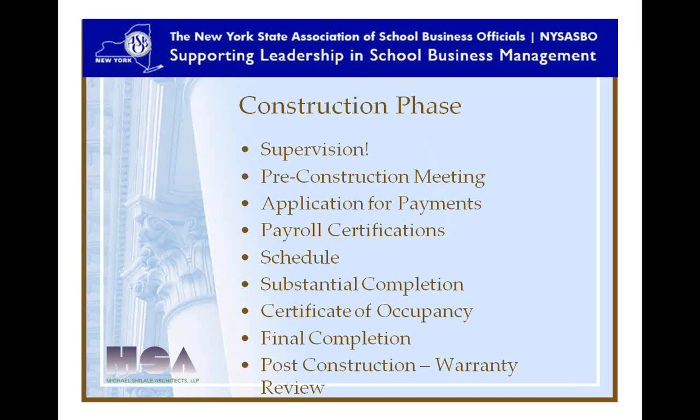It is determined by the architect or the engineer on the job. It's not determined by the contractor. So that is something that we take very seriously. It does start the warranty period and does turn over the building. We want to make sure a punch list is done at substantial completion. So any damage or any non-working items or nicks or scratches are put on that punch list.